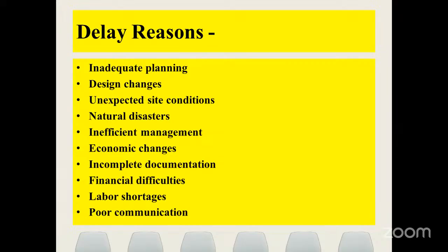We lost our cost, our money for labors. Then we had to pay extra charges for offices. We paid extra cost for our equipments. Such things happen. Also, we bore additional charges for visa and other charges. So ultimately, these things start impacting your profit also. So proper planning plays a very important role. Otherwise, you should have proper reason for the delays, so that you can claim your delay in terms of time and in terms of money.